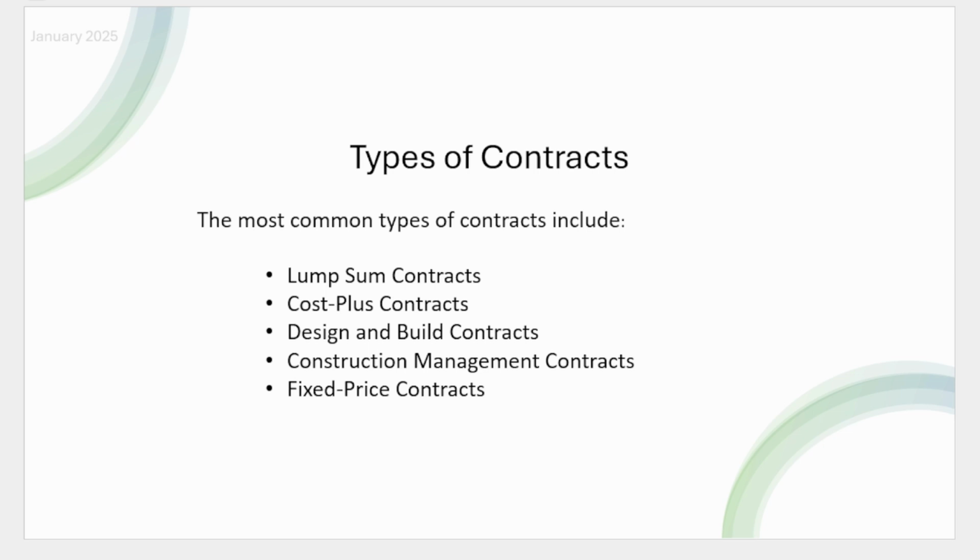budget. Cost plus contracts. In this arrangement, the contractor is reimbursed for the actual cost of labour, materials, and other project expenses, plus a predetermined fee or percentage for profit. This contract type is suitable for projects with uncertain scopes or where changes are expected during construction. The client takes on more risk regarding cost escalation, but the contractor has an incentive to control costs effectively.